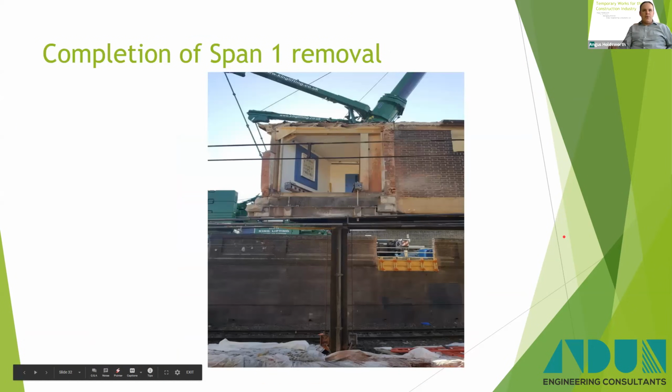So this actually shows you quite clearly the temporary works that are in place to support it. There's the steel beam that was lifted up, and there's the two super slims that tie back to these divvy dags here and down back to the pier. Quite a neat little scheme that worked very well and allowed us to stop at any point and reopen the railway.